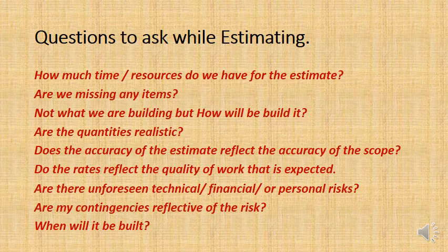If you get rates for bricklayers, for example, and some bricklayers are charging you $20 a day and others are charging you $30 a day, well, you could by all means hire the one that charges $20 a day, but he might not be as good. The quality of the brick wall might not be as good. So you've got to remember the scope. What level of quality do you need? Consider any unforeseen risks. They could be technical, such as the scope changing, or financial risk.